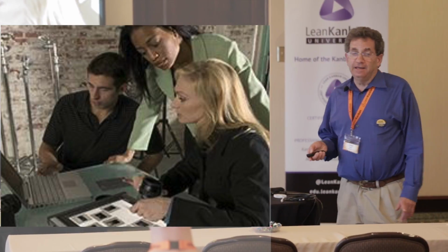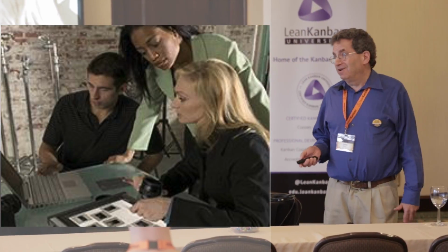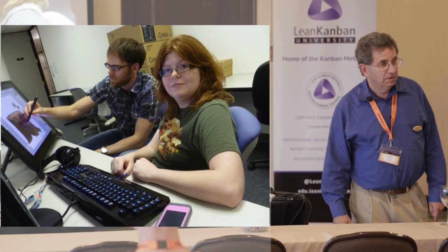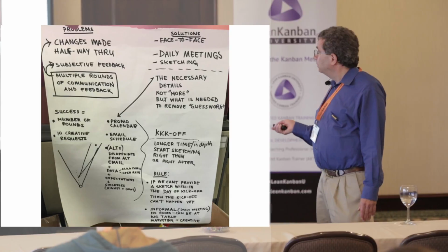Right? And most of that time was waiting for the art director to get out of meetings or finish some other work and actually take a look at it, give you some feedback, do a little tweak, and then go through that process a couple of times. Well, to reduce that bottleneck, we went to buddy checks, pairing between designers. That was one of the ways.